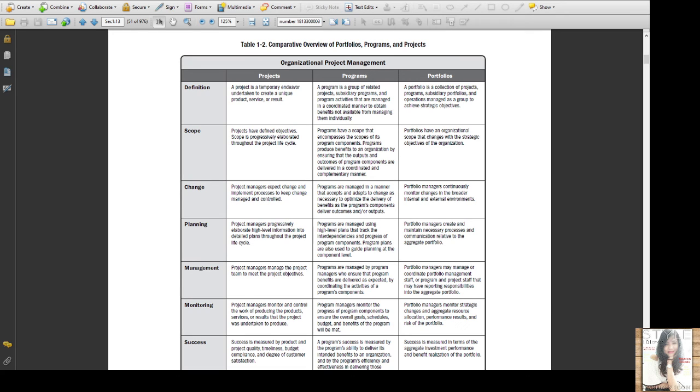For example, an infrastructure organization that has a strategic objective of maximizing the return on its investments may put together a portfolio that includes mixed projects in oil, gas, power, water, roads, rails, and airports. From the mix, the organization may choose to manage related projects as one portfolio. All the power projects may be grouped together as a power portfolio. Similarly, all of the water projects may be grouped into a water portfolio.